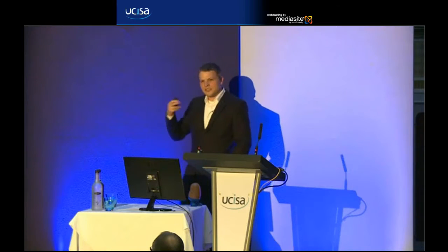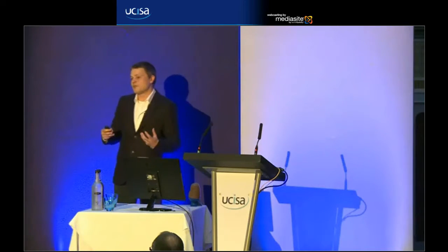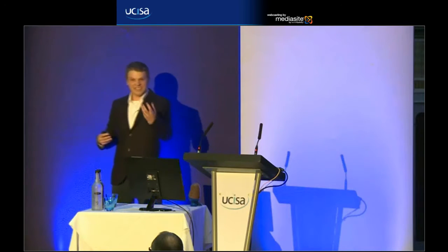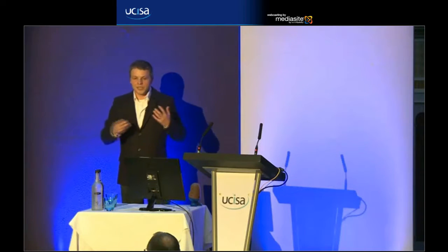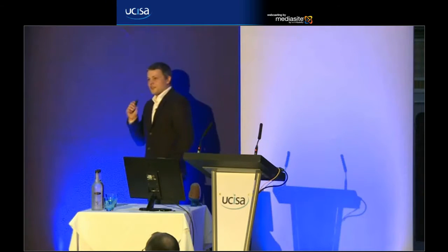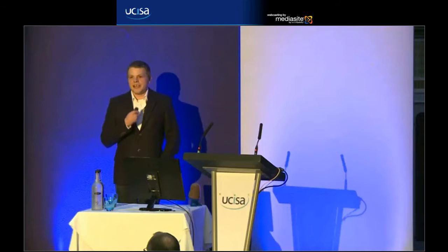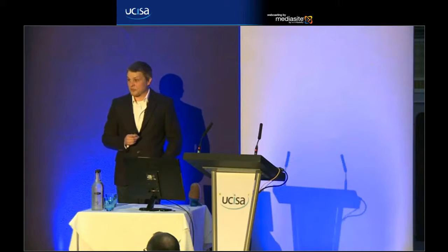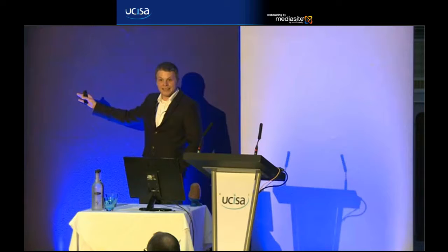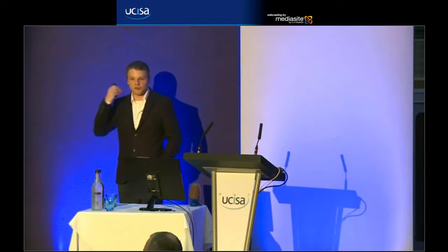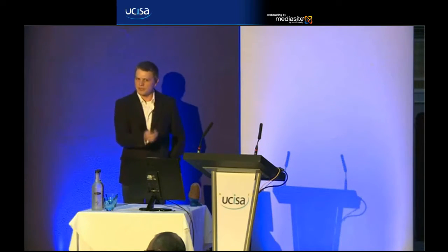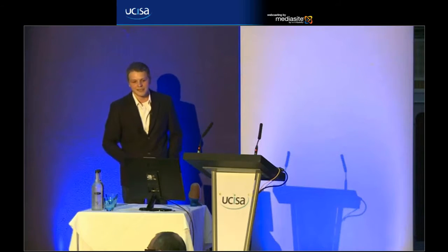Once we've got all the stories estimated, then we carry out a quick sanity check, because what we're really trying to achieve with this is the relative sizes of things. Is that 3-point thing really a quarter of the size of the 13-point thing? So we go through the stories that we've sized, and we say, have we actually got the correct relative sizes for everything? The good thing about this is it's not just me saying, I think it's going to take my developers 3 weeks to do this. Because everybody's had that conversation, they've all had a buy-in, we've got everybody saying, yeah, we're all agreed that we think that this is how big this piece of work is.